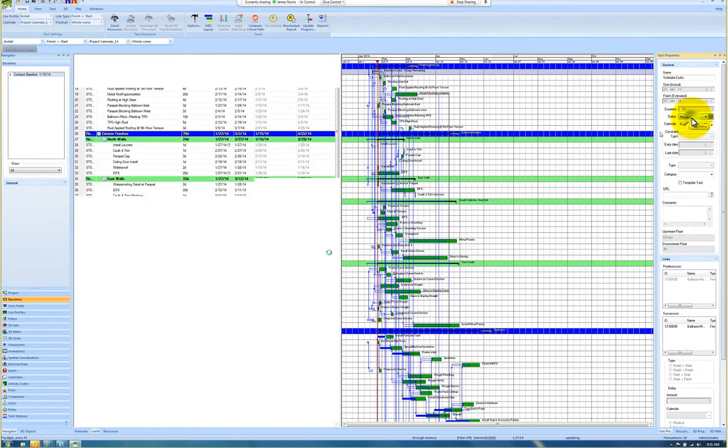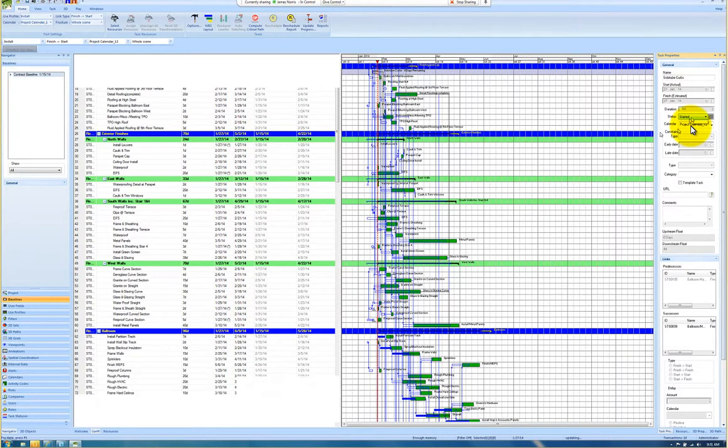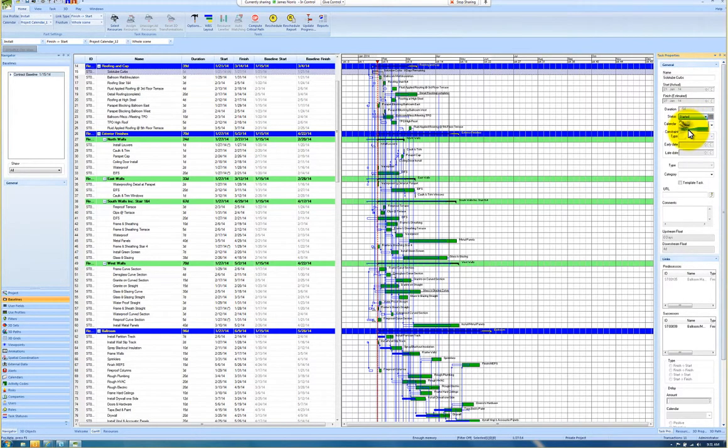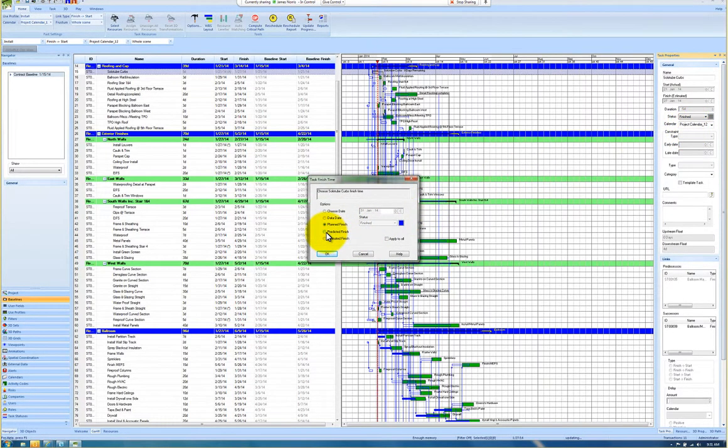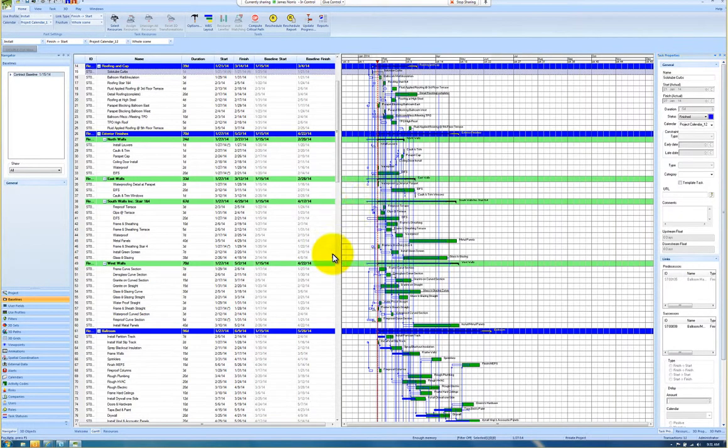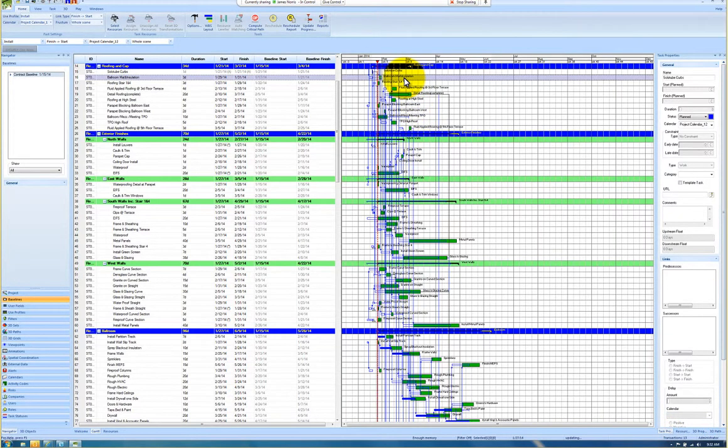All right, and now you see that it sucked it back. And the finish date, you can either click on predicted finish if it was truly supposed to be. Predicted finish is based on when it was assumed to be done based on the baseline finish, which was 121. So we'll go ahead and say OK. There you go. And if you reschedule now, as you're updating, you're going to see the schedule is sucking itself back in, getting you closer to on track to your contract schedule.